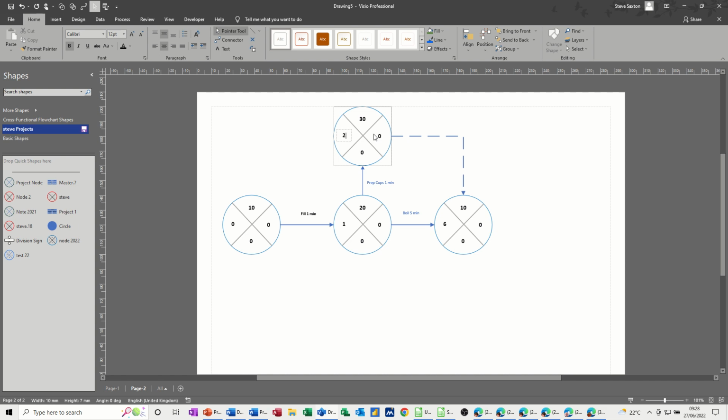And we'll fill this other segment in when we're coming back down to find the latest event time. So far so good. Now this needs a little text box to explain it. There's no time allocated to this, so just put that down there. No time. That's just a dummy connector. Back to this one.